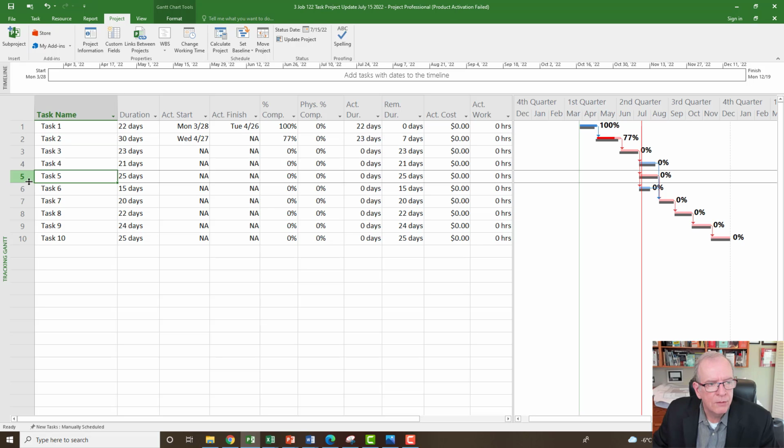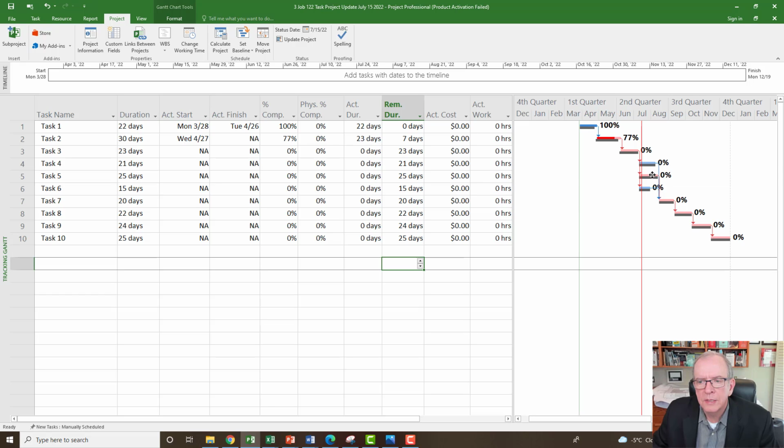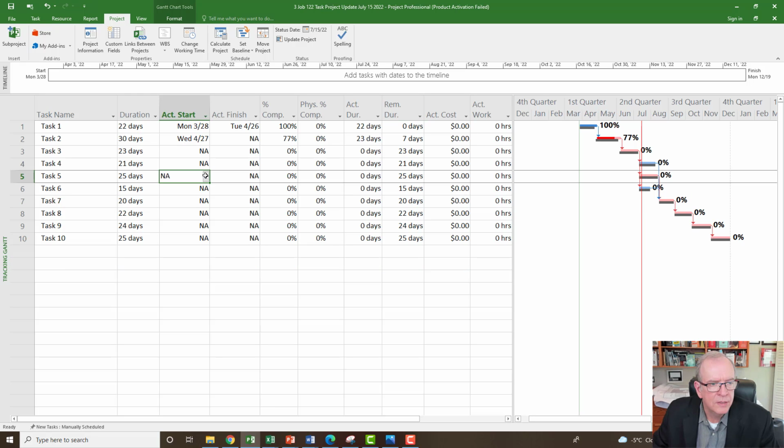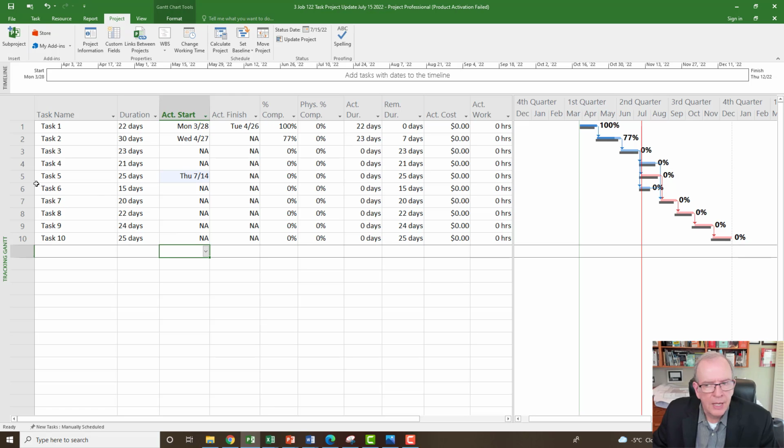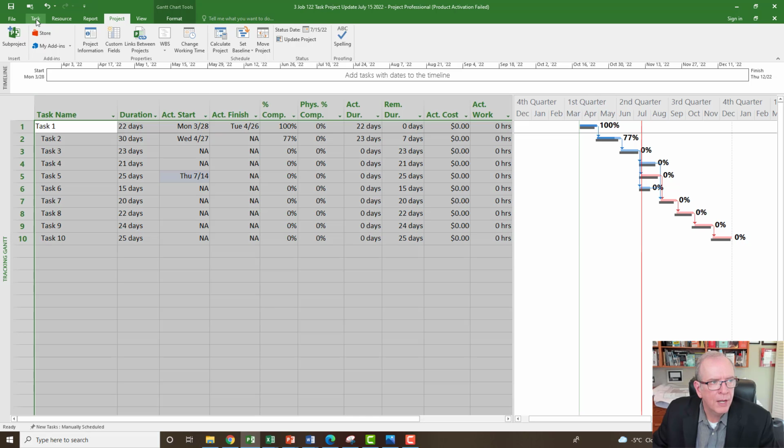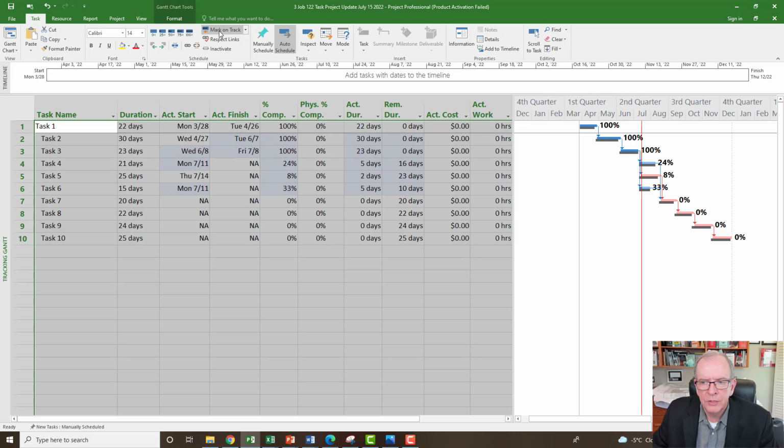So I could say, all right, we're here, and the actual start date for this activity, which was supposed to start July 11th, let's say that it didn't start till July 14th. Okay, so that's a delayed start, and that's pushing out the rest of our project. All right, but everything else went the way that we thought it would go. So I'm just going to select that. I'm going to go back up to my task tab, and I'm going to say mark on track. So everything is marked on track up to that point.